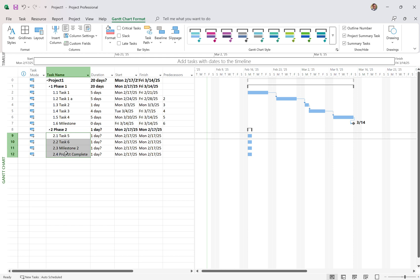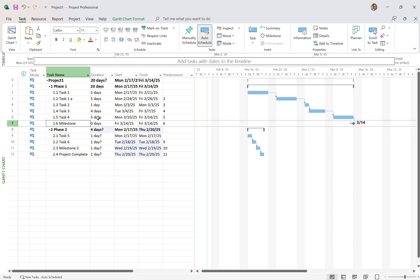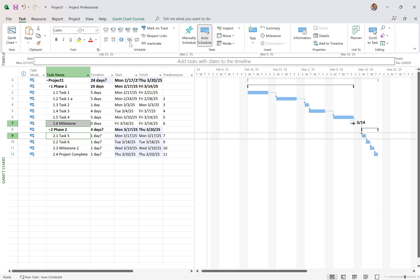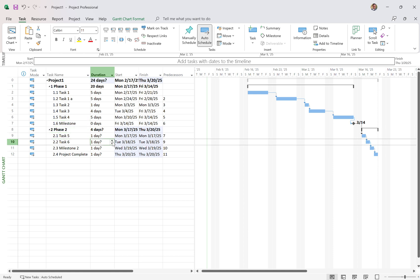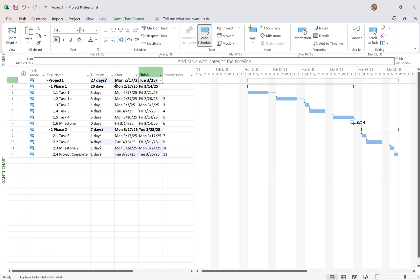I'm going to link those tasks together and link the milestone to Task 5, connecting the two phases. See how my project summary task just went up to 24 days. Quick note on the blue change highlighting: that means something just changed as a result of your last click — the finish date moved out, start date didn't change, and all those dates updated based on the last action. If I push out Task 6, the finish date, Milestone 2, the project completion date, the project summary task, and the duration all push accordingly. That blue change highlighting is quite handy.